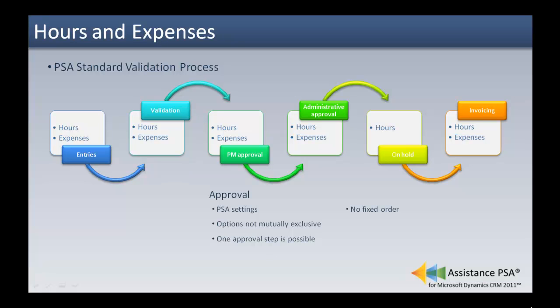You can set up workflows to send approval alerts. Best practice, however, is to display the entries to be approved directly in your dashboard. This will provide you with instant visibility and prevent overcrowding your inbox. Whatever option you choose to activate, keep in mind that the hours related to the time and material items of your projects will then need to be approved in order to be invoiced.